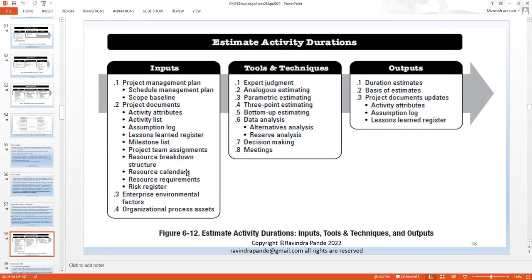So if you need your resource on, so-and-so date, let's say 28th of May, then I need to start that resource request processing from the 22nd, 24th, or 25th, whatever time it takes to get the resource on board. Now, resource on board means the resource actually starts with your project team. These types of proactive resource requirements, as a project manager, I need to process.